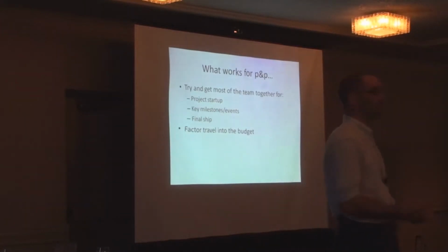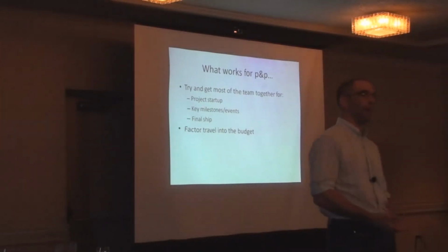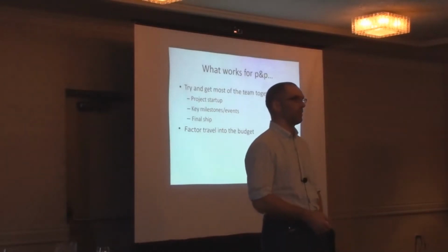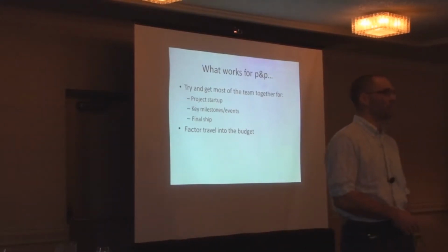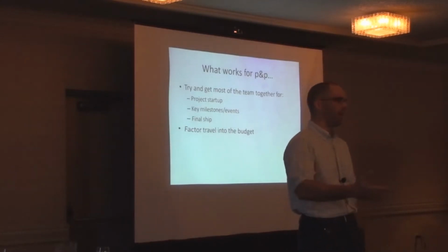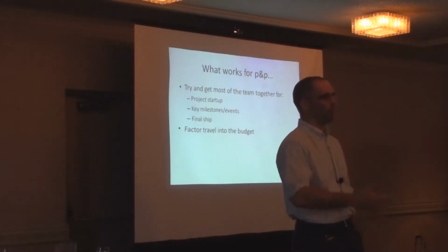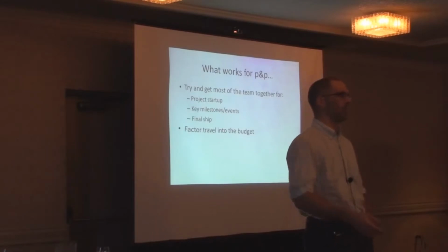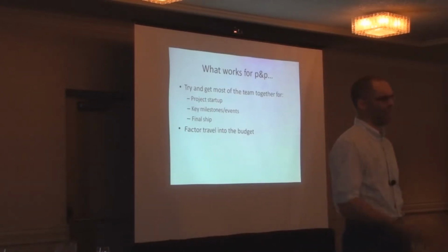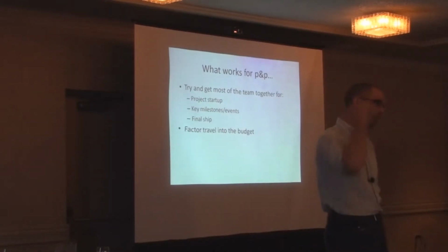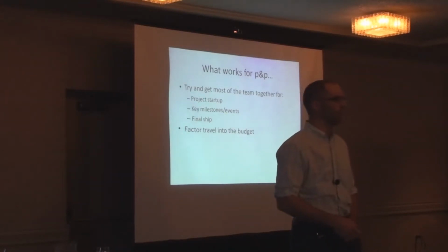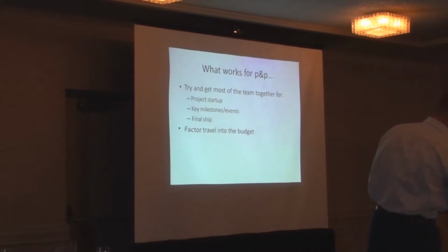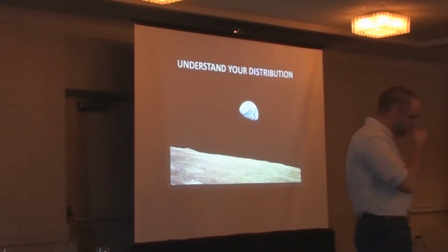And we also factor it into the budget, right? And that comes back to that whole reducing costs thing. Typically, we actually get the vendors to quote for that. So we say we want 3 guys for 6 months, and we want them coming into town. So give us a cost for that. Don't give us an hourly rate and then add in travel. We try and do that because we think it's a much more realistic way of getting the thing to be successful.